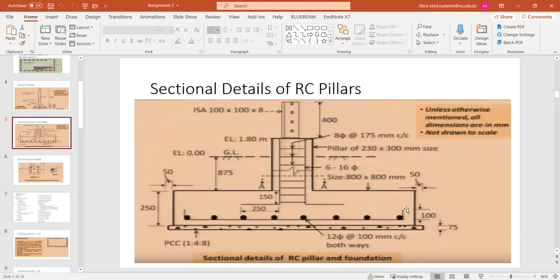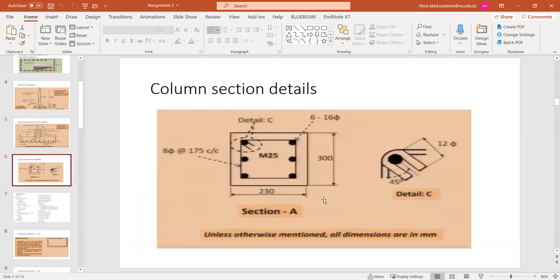So therefore, now we are scheduled, and then we are going to place these steel bars and then the formwork for this. So it will be better if you place the steel bar for the footing first, and then provide the lateral supports. So these lateral supports should be provided on four sides, this side, and then four sides. So four sides lateral support will be provided as a formwork for the footing.